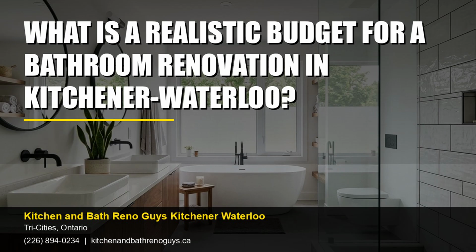In Waterloo, the housing landscape is dominated by post-1980s construction, which generally results in more predictable renovation costs. Homeowners can expect to spend between $12,000 and $25,000 for a bathroom renovation in Waterloo. The newer homes typically have updated systems, reducing the likelihood of unexpected expenses. This allows homeowners to focus more on aesthetic updates rather than fundamental structural changes.